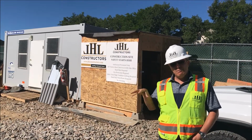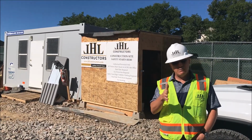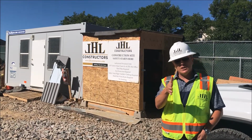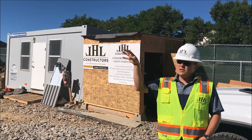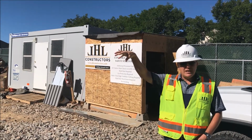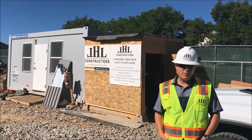However, when we're not picking materials, that crane is going to be in weather vane or wind vane mode, where it's going to swing whatever direction the wind blows it. So although you may see the boom go over the school, there'll never be a load that's picked and swung over the school. When we have to start to pick rooftop equipment and the mechanical units that go on the existing roof, that'll be done during off hours and on the weekends when there's no occupants within the building.